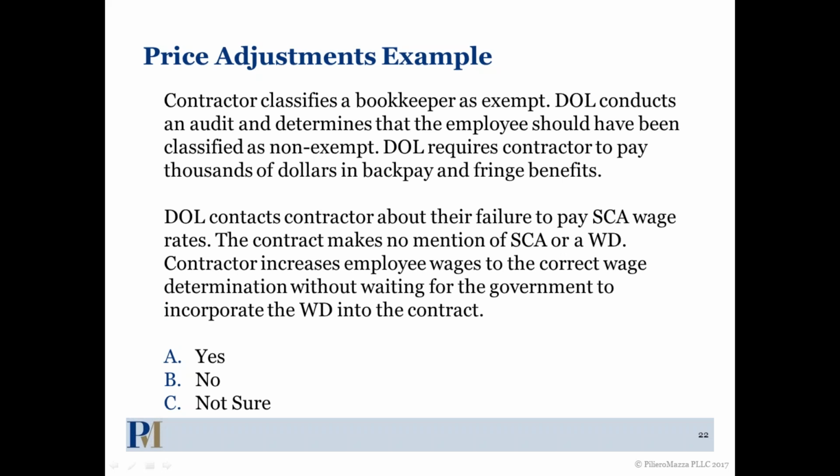And the correct answer is no, and for a couple of reasons. First of all, you'll notice that they had a classification issue here, right? So they had classified somebody as exempt versus non-exempt. So if it's a classification issue, unless the contract specifically said they have to be exempt or they have to be non-exempt, assuming it's like most contractors and most contracts and the contract just says classified people, then that would be one issue. The other issue was that they increased the employee wages in advance of the modification.